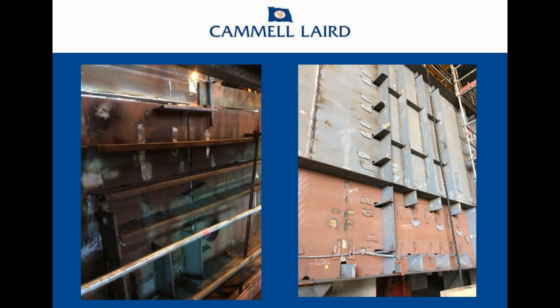On the right-hand side, it's just showing a bit of good practice. This is the working face for two modules. And you may be able to make out the different plates that have been tacked onto the face of that. They're all the different filling plates that will be fitted after the two modules have come together. And this is just good practice because it saves you having to route those small plates out of the stores, down through the ship, and then to the workplace. You literally just grind them off the face and fit them. This was adopted throughout the aircraft carrier, and it saved an extraordinary amount of time and effort. It's a small thing, but these are the sorts of things that come out with experience when it comes to design for modules, design for assembly.